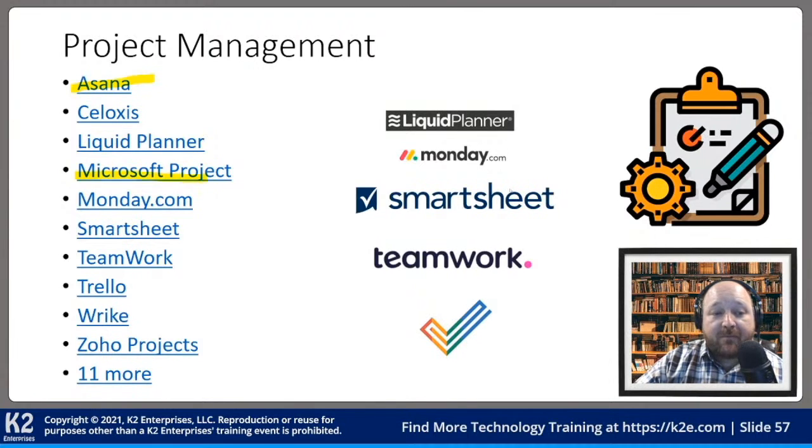I'm also a big fan of Trello. And Microsoft Planner. Planner and Trello are what we refer to as Kanban style of project management, where projects are organized into cards, with each card representing a deliverable, and then it's organized using swim lanes. These swim lanes represent stages of the project.